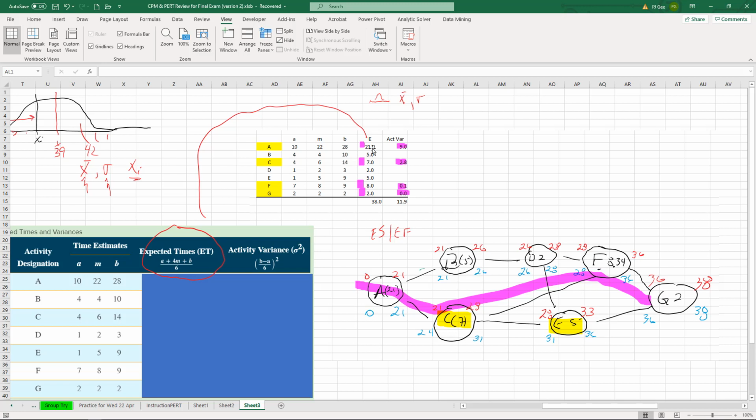So when we're going through the early start, early finish analysis, when we have a, what do we call it, confluence, the confluence of two events come into F, two activities come into F, notice D and C, that's the decision point. Okay, so remember, we're trying to figure out what the longest path through here is. We have one northern route, we have one mixed route through here, sort of north to begin with, drops to the south. We have one from the south that goes to the north. And then we have finally one along the bottom. So there's 4 paths in here, okay?